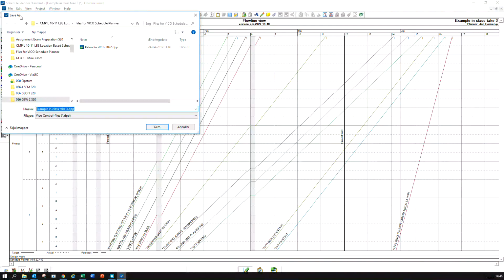But one other thing, the calendar, the project calendar. We have a US calendar. There is a Danish calendar you can choose, but it's absolute gibberish. It's not right, so don't waste your time on that. If you don't have access to calendars, you need to create your own. Click New Calendar and then simply add your own relevant holidays.